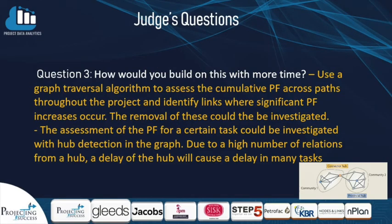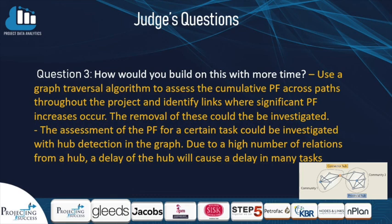If we had more time we'd like to explore the problem from the point of view of the graph that represents the schedule. One way we could do this is use a graph traversal algorithm to assess the cumulative priority factor across different paths throughout the project, and by identifying a high cumulative priority factor you can work out which links could possibly be removed to reduce the project time. Another way we could investigate the graph is by identifying hubs using a hub detection algorithm. A hub is a node that has a high number of links into and out of it, so by decreasing the number of links you're decreasing the risk that a delay in this hub will cause delay to future tasks.